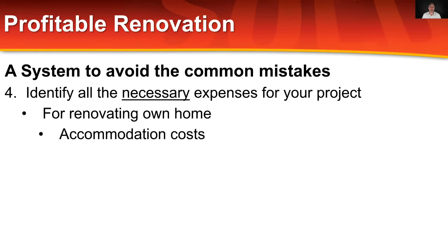Or if you're looking to renovate your own home, do you actually need to leave home while the renovation occurs? Or are you going to do this around yourselves? Buy, live-in reno projects actually can be quite testing on a marriage, on a partnership, for kids. So if you're going to do a buy, live-in reno, my suggestion, what I've found historically through people I've mentored and in my own life, is when you're young and there are no kids, you're far more tolerant of that sort of thing than when you're as old as I am now and you have kids. They're far less tolerant of mess and ugliness for longer periods of time. So generally speaking, if you're going to do a massive cosmetic renovation, you might want to leave. If you're going to do a structural renovation, you have to leave. So you'll have to incorporate your accommodation costs in that.